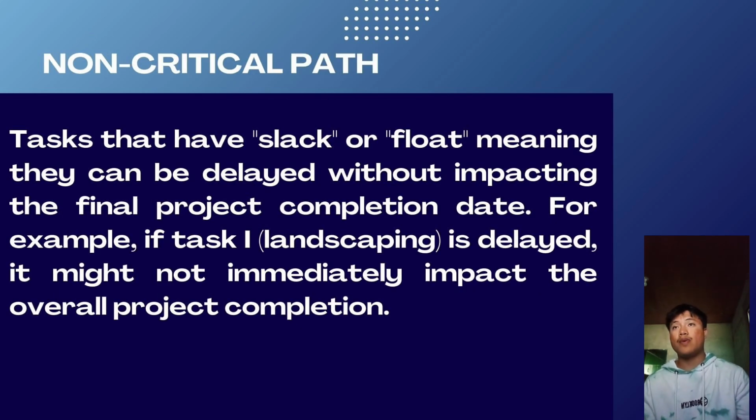And we have the non-critical path: tasks that have slack or float, meaning they can be delayed without impacting the final project completion date. For example, if task I, landscaping, is delayed, it might not immediately impact the overall project completion.